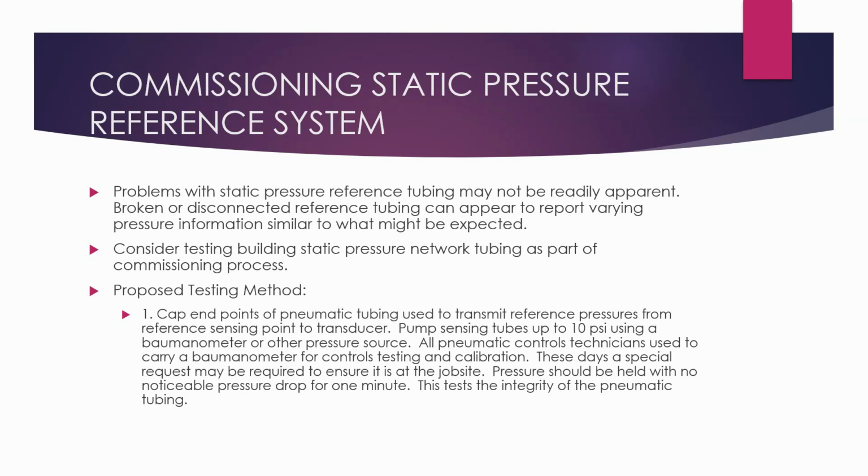Static pressure references should be checked. They're pretty easy to check. So the way I would check building static pressure is I would plug the outlets and simply impose a pressure onto the tubing system and pump it up to, say, 10 psi using the typical thermometer, which is used by pneumatic controls technicians. But you could use anything to pump this thing up.